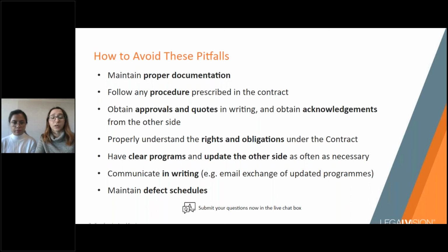Like Leslie said, you may also look into keeping a site diary or a work diary where you can regularly record important and contemporaneous information such as discussions, type of work performed, any instructions given to subcontractors, any issues or defects identified, or even records of inclement weather such as rain that may become relevant if you need to seek extensions of time in the future. You might also think about taking photographs to document the progress of the works or any issues that arise. These records can be kept at different frequency. It may be daily, it may be monthly, but the key is that all of these records are ongoing.